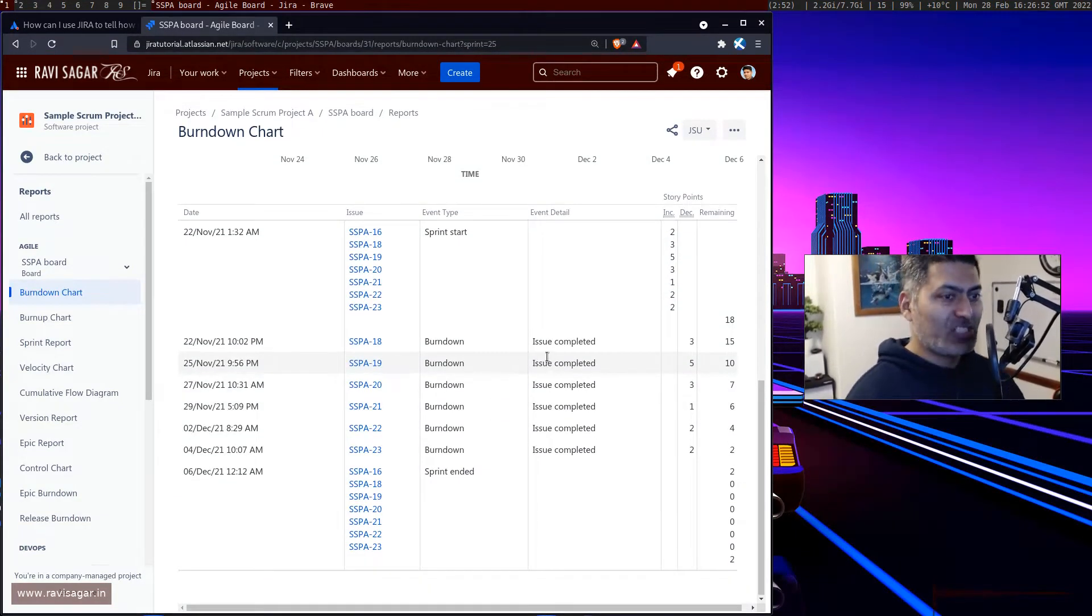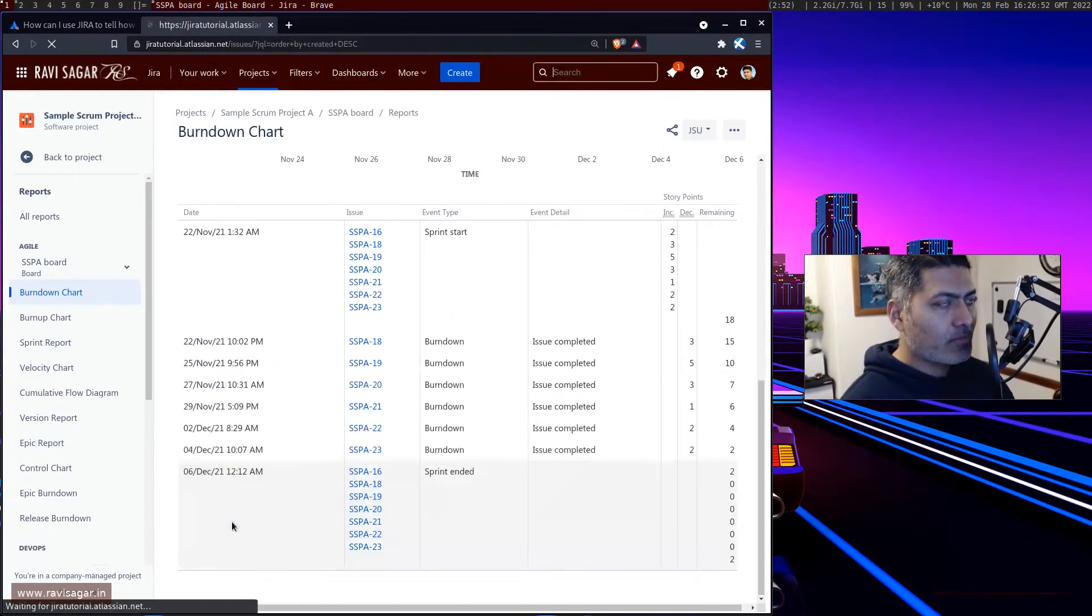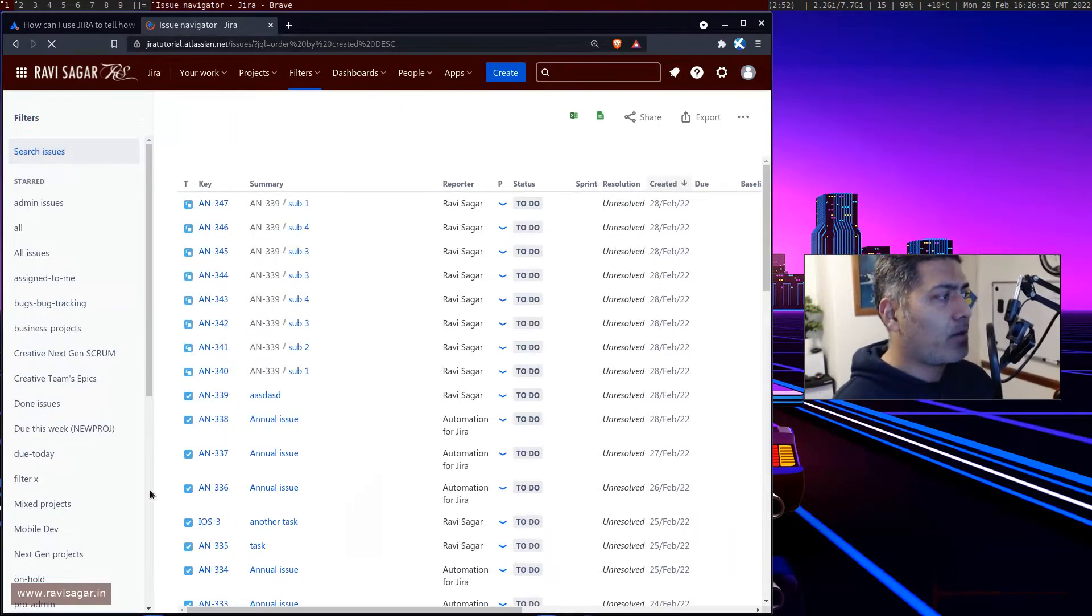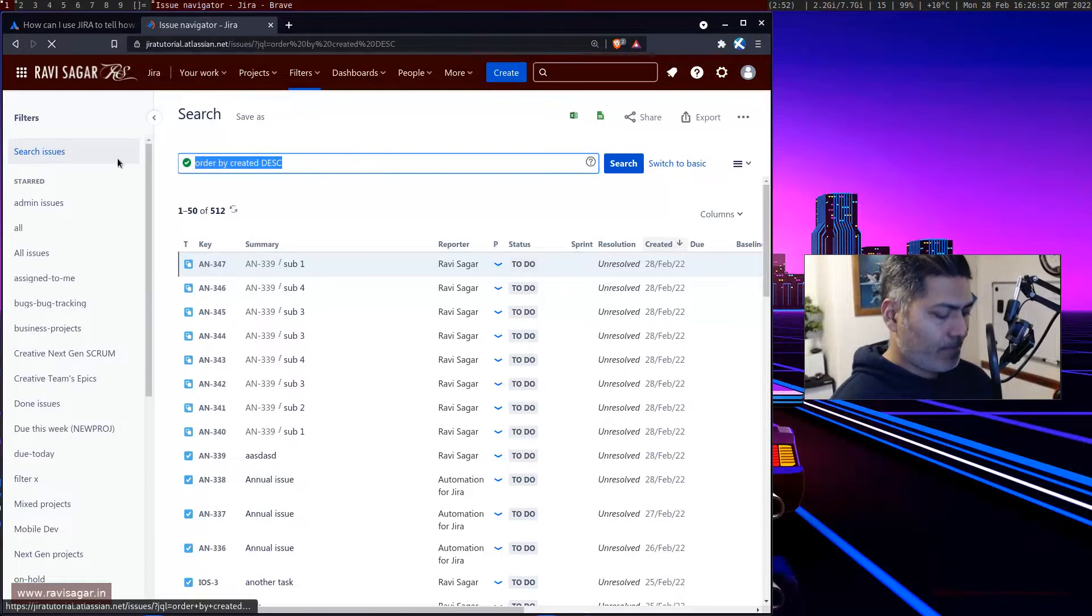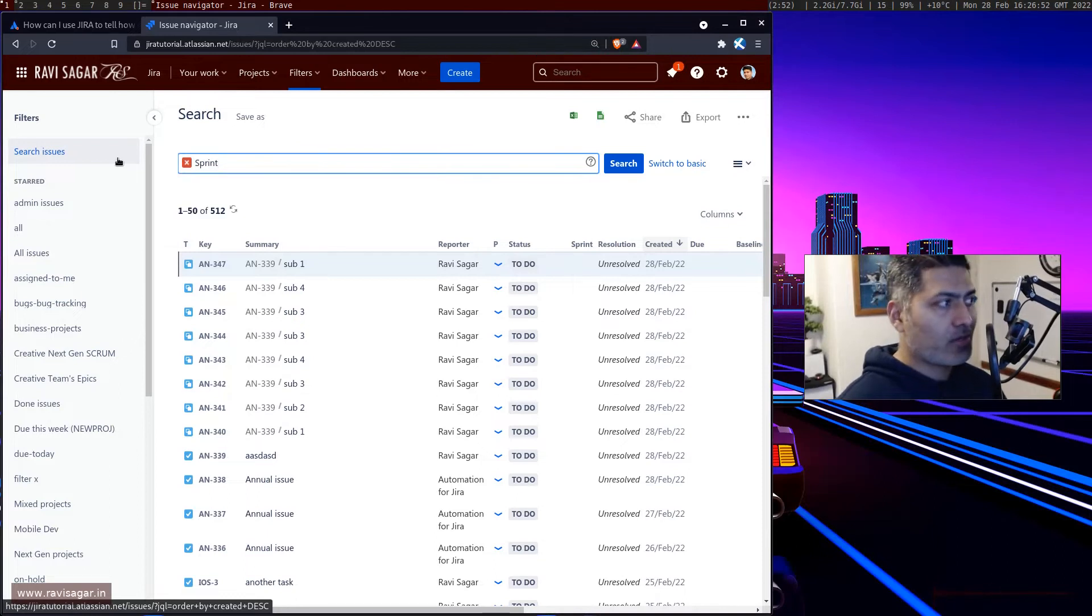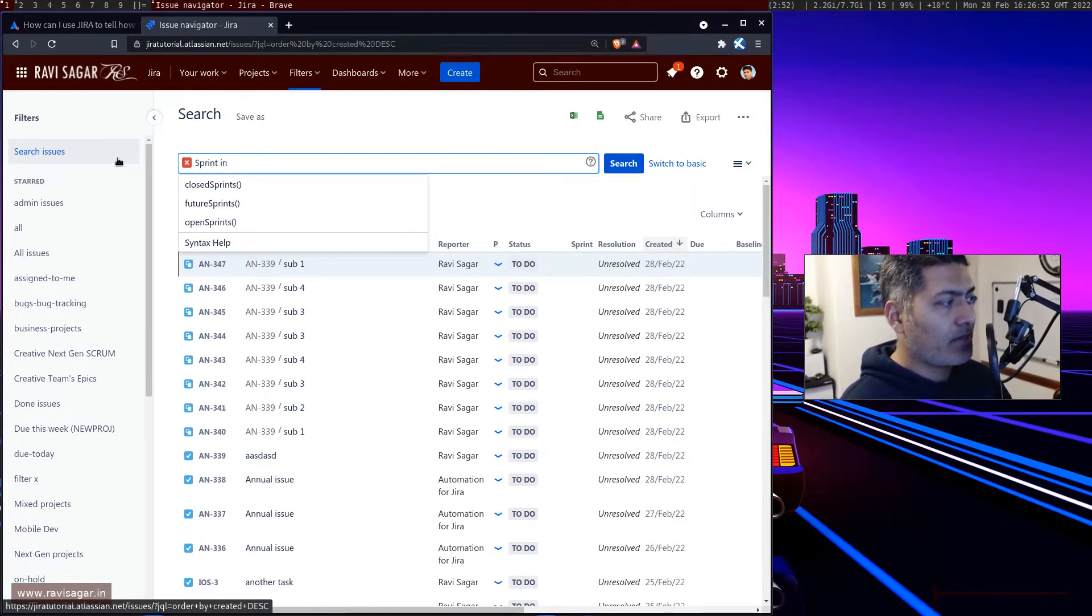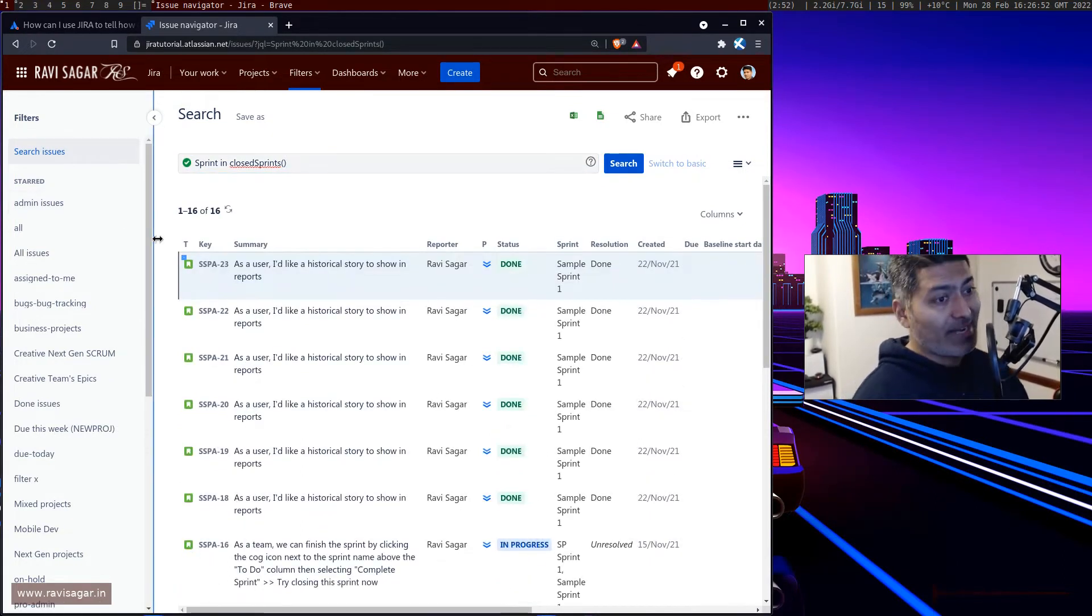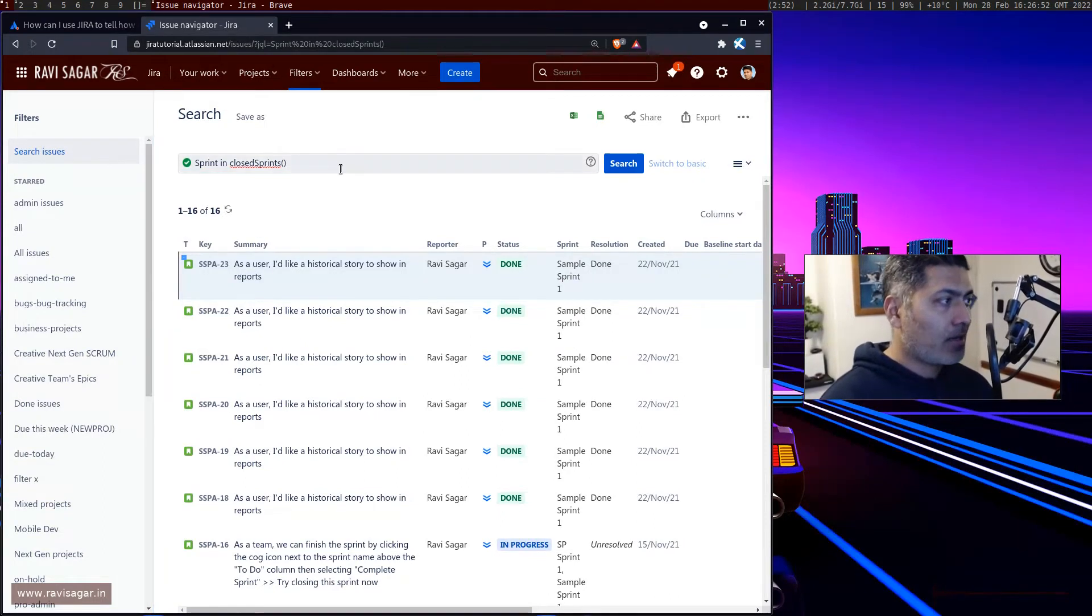There are some JQL functions that you can also look at. For example, if you want to know all the issues where the sprint is closed, you can do something like sprint in closedSprints. Basically, all the issues that are part of a sprint that is not active or closed, you will get the list.